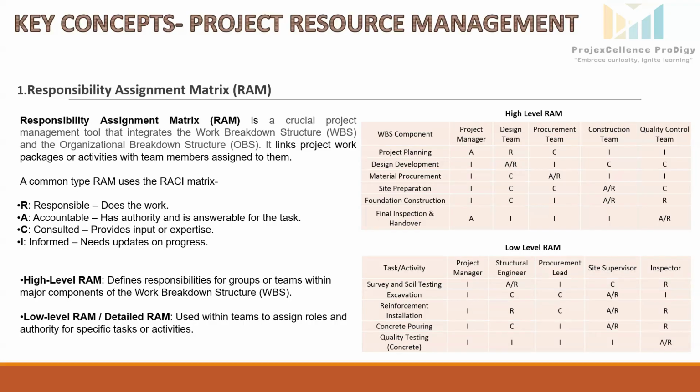A means accountable, the person who has final ownership of the task and ensures it is completed. In our case, the project manager, or we can say contractor, is accountable for overall project execution, ensuring construction is completed on time and within budget.